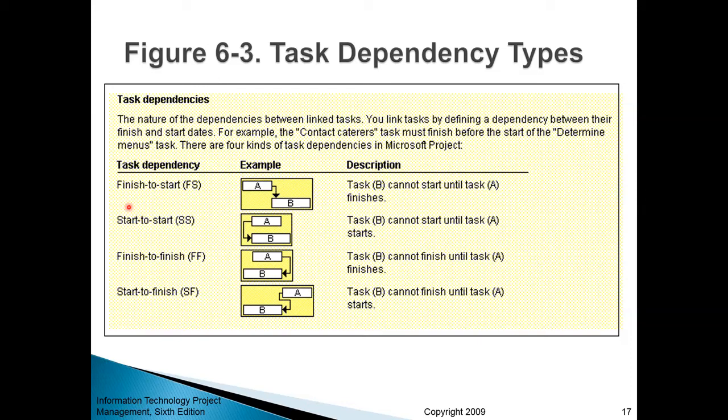First of all, the most common one, finish to start, or FS. Finish to start means task B cannot start until task A finishes.